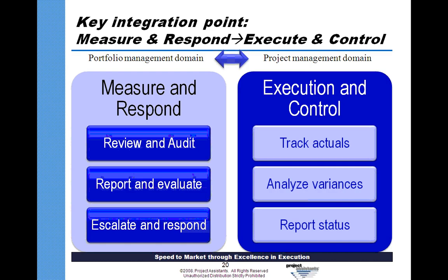of project management, it's perfectly normal and natural for a project manager to be stuck in denial when we see a big gap. You go, maybe we can make it up at the end. Maybe we can eliminate testing, God forbid, at the end of the project. The things we see get cut at the end of a project: training materials not being well defined, users not being well trained, testing and integration not being well done. Those kinds of things can really be the result of us being stuck in denial when variances occur. Being stuck in denial that we need another month, we need another $100,000 to get this project done.